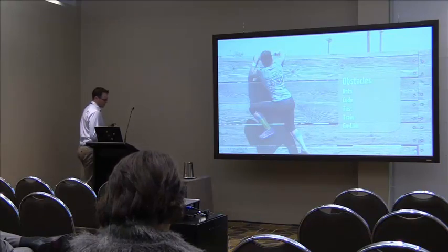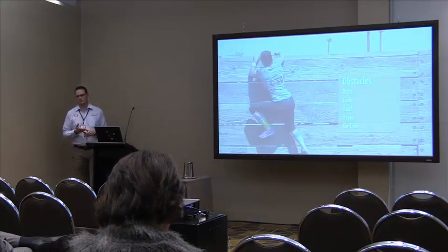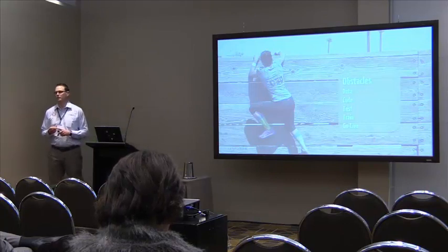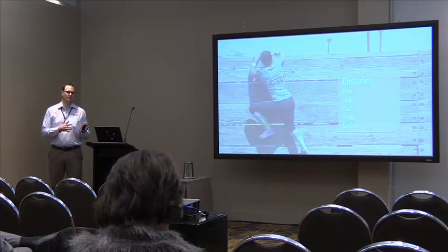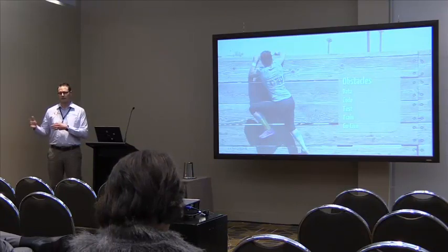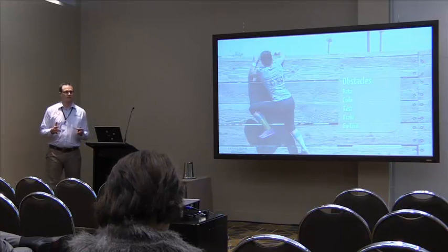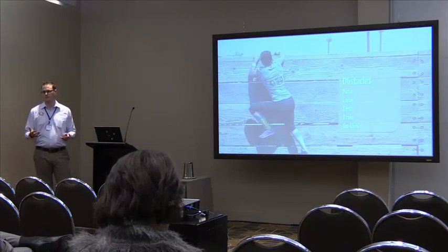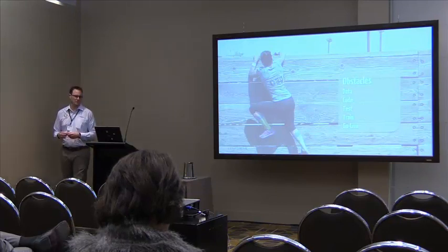Testing, training. Most people upgrading to the new release of 9.1 have got to deal with the new UI. Most of the time when you previously upgraded from releases 8.9, 8.10, 8.11, 8.12, the user interface didn't change in navigating around, but now everyone's seeing the new UI, so you've got an additional cost from a training perspective that you normally don't have.